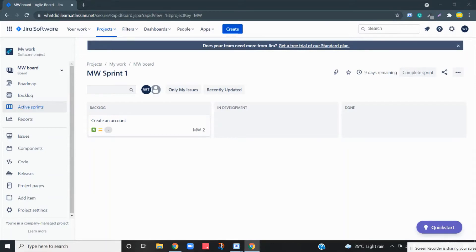We are going to learn how to add a few more columns to your Jira board. If you see, this is the default view where you have three columns: Backlog, In Development, and Done. But in our day-to-day life as agile teams, we might need more columns.